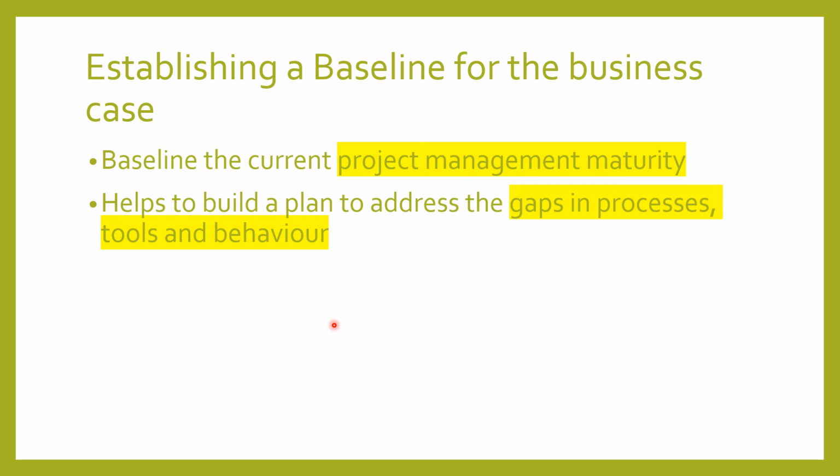Right? The final foundation of OPM is establishing a baseline for the business case. So you need to know where you are starting. You have to baseline the current project management maturity, and what is the target state. Once you know where you are and where you want to go, it is easy to build a plan to address the gaps in processes and tools and behaviors. Establishing a baseline is very, very important. One of the foundations of OPM.